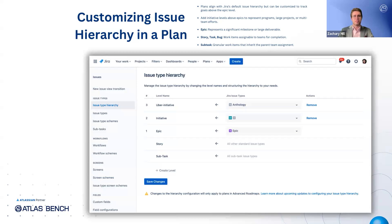This is especially useful for representing larger, more strategic initiatives that span multiple teams or involve multiple projects. For example, you might introduce an initiative level above the epic. Initiatives can serve as containers for multiple epics, helping you visualize and manage cross-team efforts. Epics themselves represent major milestones, while stories, tasks, and bugs capture the granular day-to-day work that your teams will deliver. Subtasks go even deeper, providing a fine-grained breakdown of what needs to be done. By customizing your hierarchy, you create a clear picture of how individual pieces of work roll up to broader organizational goals.